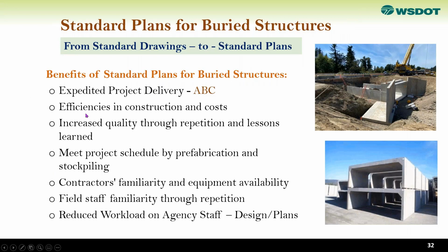Moving from a standard drawing to a standard plan has other benefits. As Mark mentioned earlier, we have a huge volume of these buried structures to deal with. The standard drawing helps us in designing each case, but the standard plan is going to be pre-designed so it could be used directly in construction.